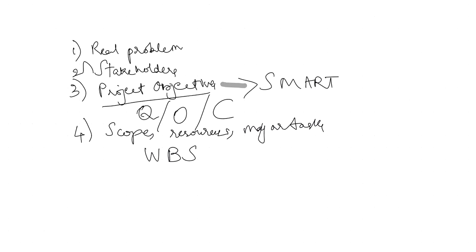The goal X. Continue to ask this question until you have clarity to break down this goal X into the intermediary steps. Estimate how long it will take to complete these tasks and how much they will cost, in terms of dollars and person-hours, the number of steps involved. Again, it boils down to dollars and person-hours.